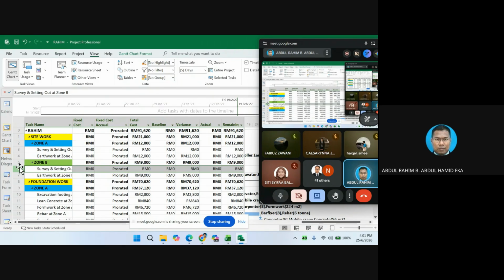And we are going to fill in the missing costs. Where do we put them? We are going to put them under the fixed costs. Contractors normally, if for instance they do not put costs using our concept, will put all the costs here under fixed costs. And still, it will give what we call the cumulative total cost anyway. And from that, they can also generate the S-curve as well.